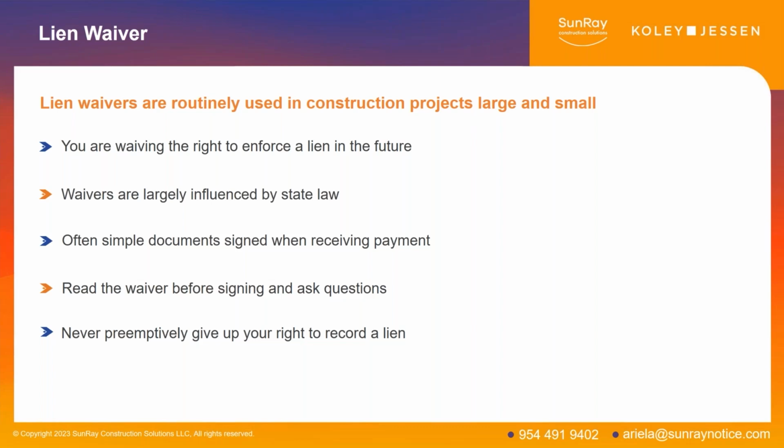And our final point on lien waivers today is to be aware that you don't want to preemptively give up your right to record a lien at all. Lien waivers typically may reduce the amount of a lien that you can record, but you don't want to preemptively say, I'm not going to be recording a lien, and put that in writing and sign.